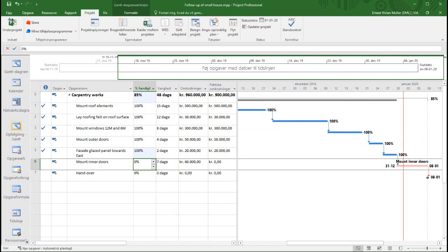Let's say that this one is only 5% finished. And these percentages, or let's make it a little bit more, let's say 15% finished. You can see these activities are assessed by the executing subcontractor, and he will send these values in to the design and build contractor for payment. Of the total value of the contract, 909,000 has been executed.